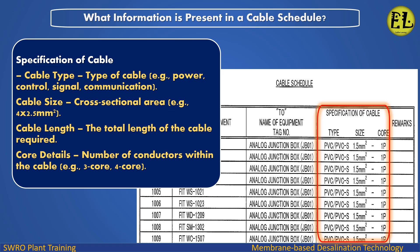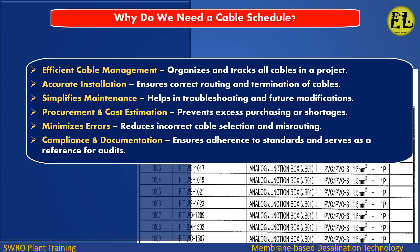Cable size: the cross-sectional area, for example 4x2.5 mm². Cable length: the total length of the cable required. Core details: the number of conductors within the cable, for example 3-core or 4-core.